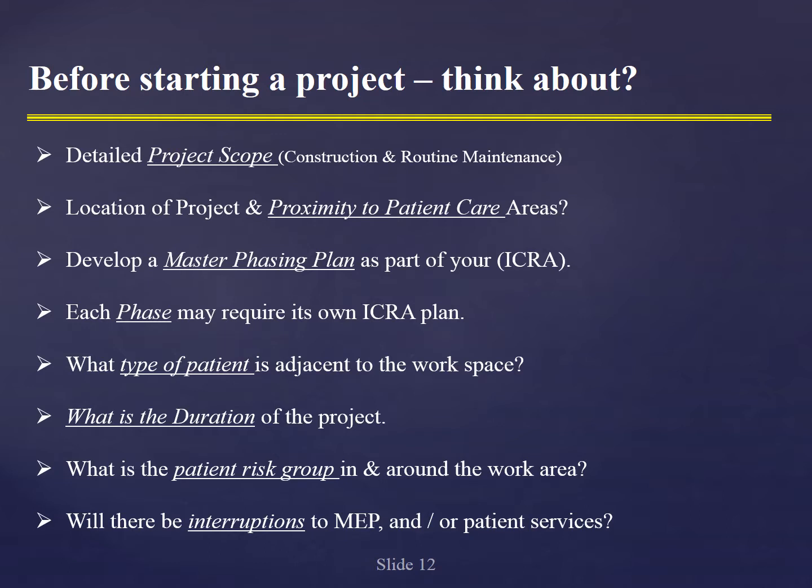What type of patient is adjacent? We talked about that just a moment ago. And again, the duration. Very, very important. The biggest thing with duration, we'll talk about it some more a little bit later, is the fact that when you build a wall or you build a barrier, because it is temporary, it changes. And because work is going on, there are often impacts, and I mean physical impacts, to that wall or to that barrier that change during the duration. I have seen many examples of long-term projects where the barriers have deteriorated significantly because of time and because of the intensity of the work. Again, what is the patient risk group in and around the area?